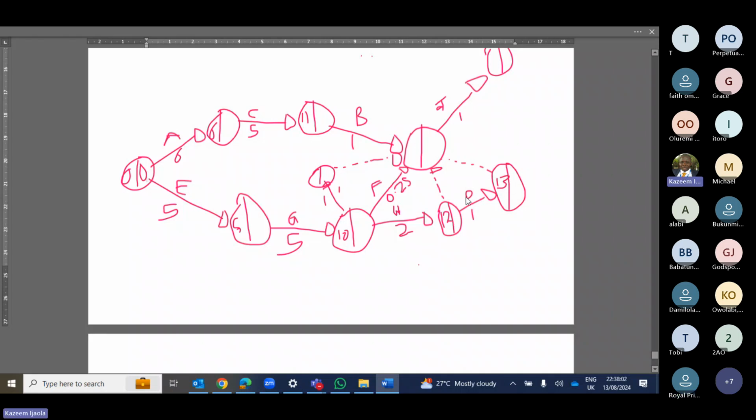Okay, now let's go. So, let us solve this B now. Remember, we have 11 plus 1, 12, Abi. That's option A. Then we have 10 plus 1 here, 11, Abi. Option B. 10 plus 0.25, that's 10.25, option C. Then we also have this 12 too, can come here too. So if you check, the highest should be 12, Abi. So I'll put 12 here. Yeah, the highest is 12.